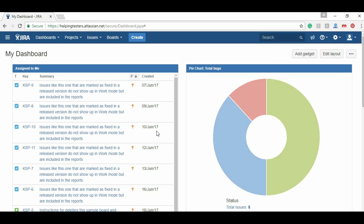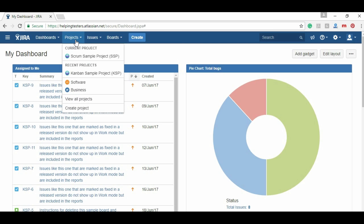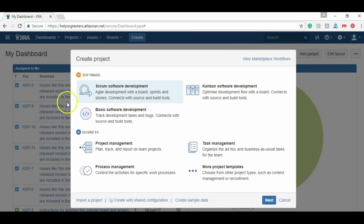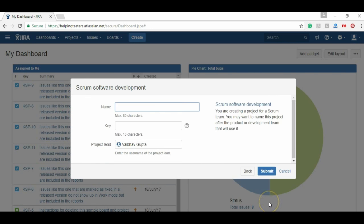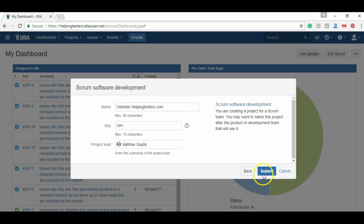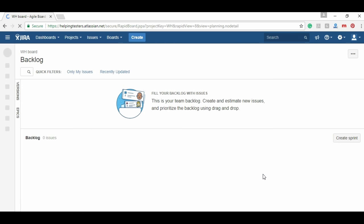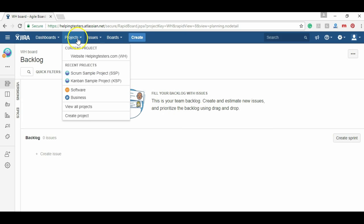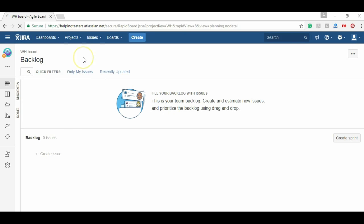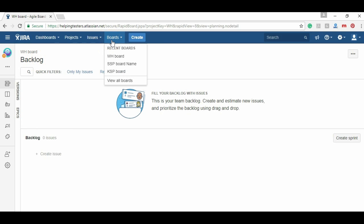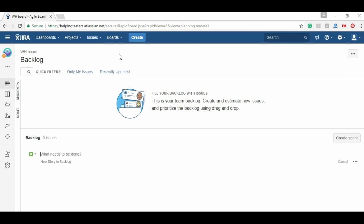We will be considering that we need to develop the home page and the support page of the website. Let's create - we need to first create a project. I will do create project. I will be building a scrum project, so click on next. The name would be website helpingtesters.com and that's all. Key is fine. Click on submit and a project is created. If you go here, you will see this project is created. Let's go to the board because as the project is created, its board is automatically created. Let's go to its agile board.